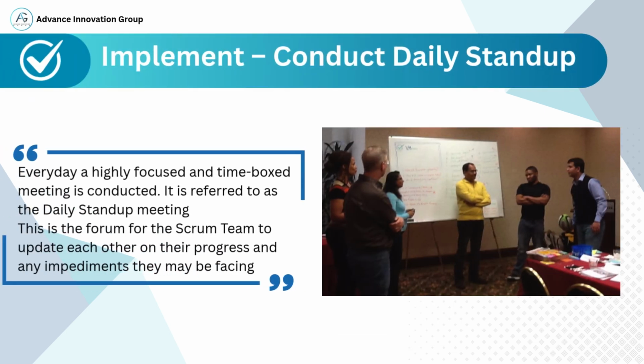In the Scrum framework, the daily stand-up is one of the most critical practices that enables effective team collaboration and communication. It is a time-boxed event, typically lasting 15 minutes or less, and is conducted every working day during the sprint. The main goal of the daily stand-up is to allow team members to synchronize their activities, share progress updates, and identify and communicate any blockers or impediments that might impact progress.